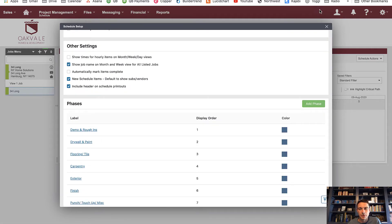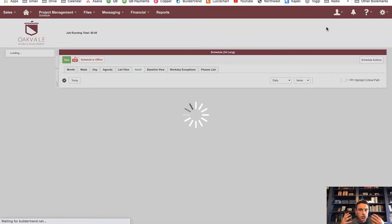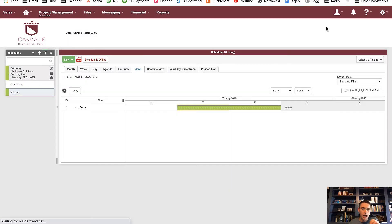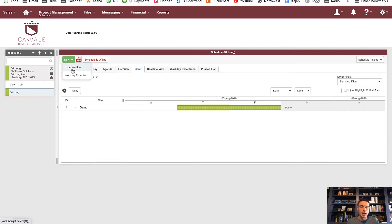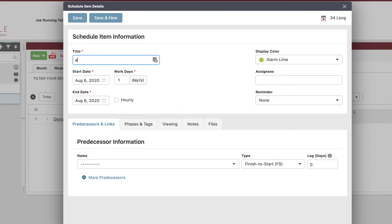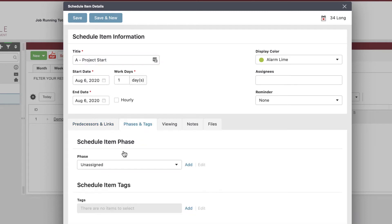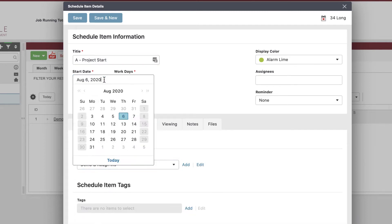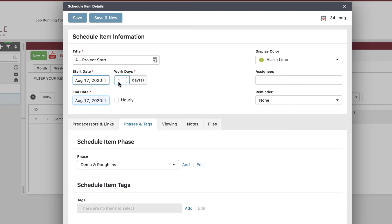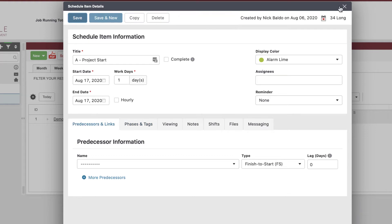Now I want to demonstrate the most valuable part of a BuilderTrend schedule: predecessors. What I do with all my projects is create a schedule item called 'A - Project Start.' The only reason I put the 'A' there is so that alphabetically it shoots to the top. I put it in the very first phase — demo and rough ends — and set it to when I'm going to start the project. Maybe I told the customer we're going to start on or around August 17th. That's a one-day item.